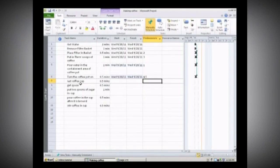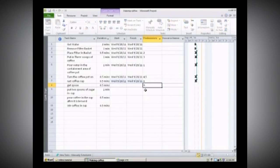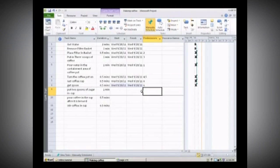Now we're going to let the coffee brew and get a cup. Once the pot is on and completed, activity seven follows six. We also want to get a spoon — we could get our spoon at the same time as getting our cup, since we have two resources. So that would also follow six. Then the person with the spoon gets the sugar and puts it in the coffee cup — that's a merge activity, so we put in 7, 8.